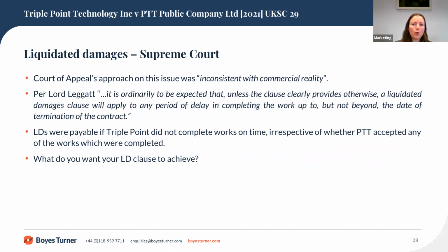earlier this year, when Lady Arden described the Court of Appeal's previous summary of the issue as a radical reinterpretation of the law relating to liquidated damages and inconsistent with commercial reality. She commented that liquidated damages are supposed to be a predictable and certain remedy, and that parties must be taken to know that their entitlement will end on termination of the contract. After that point, the parties may seek damages for breach of contract under the general law.